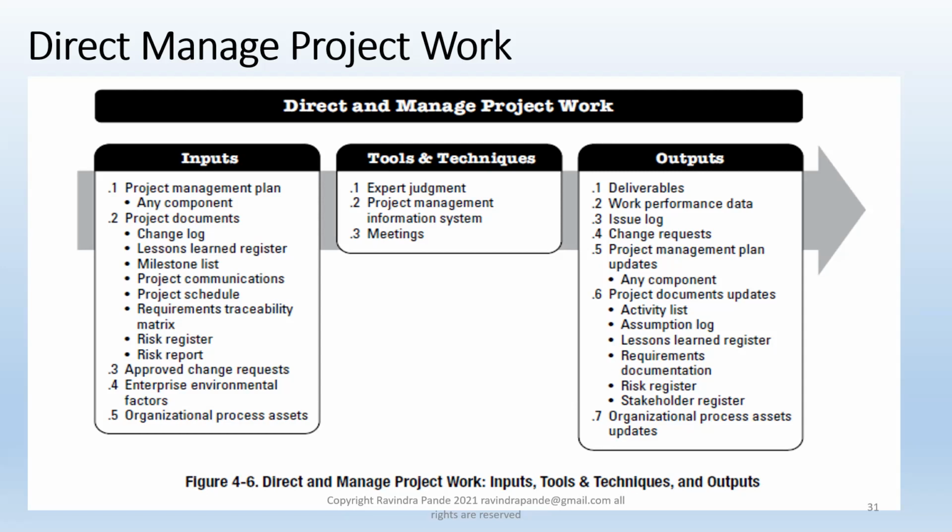So normally, if you talk about resource attrition type of risk, and these risks are common, so normally included in every risk register. So there's a risk of attrition of resources. Attrition means the resources leaving the organization, leaving the project because of his or her personal gains, and this is a common risk. So out of 10 resources, there could be 1 or 2 resources who are looking for better opportunity, might be for their career aspirations and all those things. So we need to add these risks to understand.